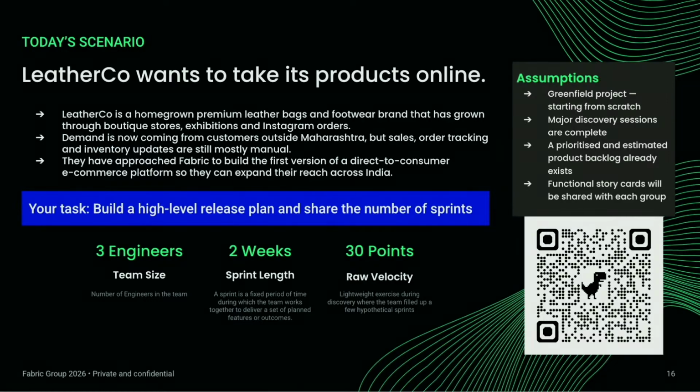I started with 4 developers working on story points, then I had to reshuffle to 32 so that the release could be smooth across the sprints. But I think he knows how to capture all the release velocities and all those things. So we'll have another meetup on that. It's the most complex thing, because if we assign 10, then those 10 will never be finished. If we assign 8, QA can verify those 8 stories and we can close them in the sprint, and they can be ready for UAT.